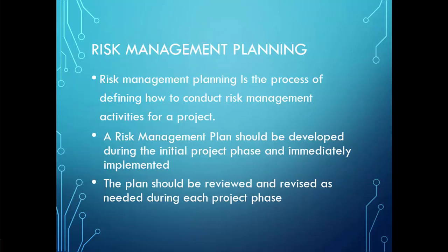The risk management planning process identifies the different tools and techniques that will be used to manage project risk. In addition, it will provide mitigation possibilities. The risk management plan will be developed in the initial phase, identifying how to respond to undesirable issues. During project execution, the plan can be revised and updated to make sure that it's covering any possible new risk.